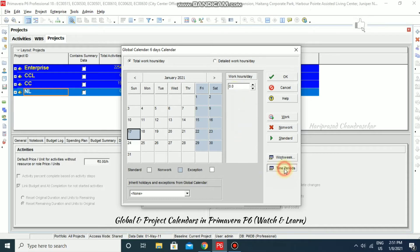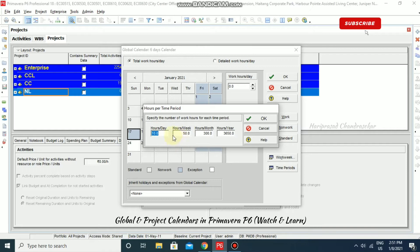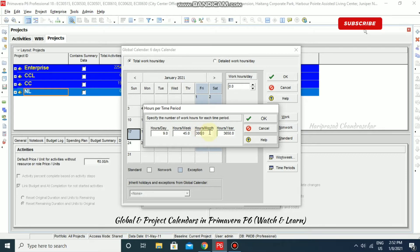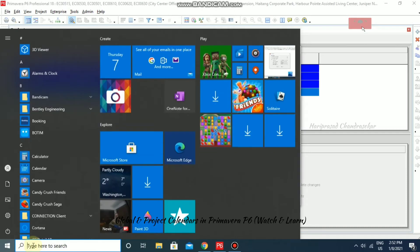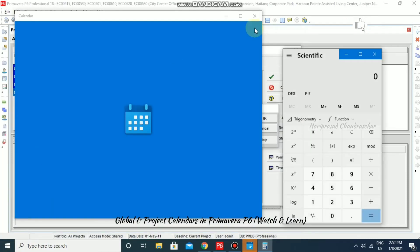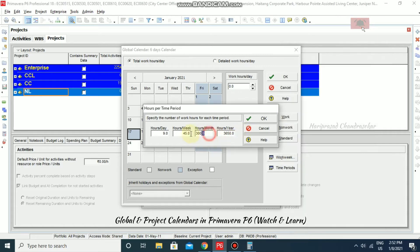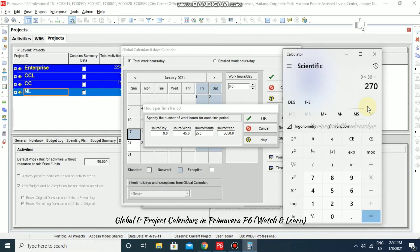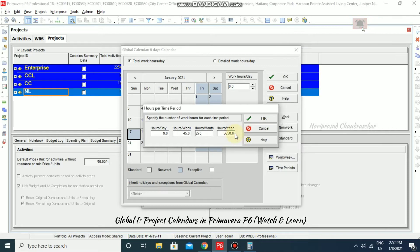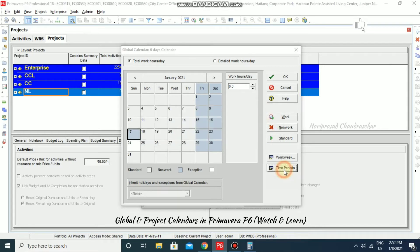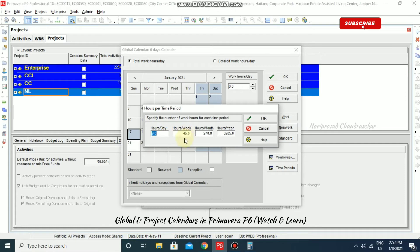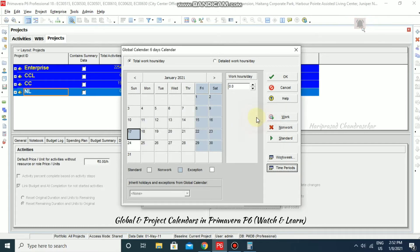Under Time Period, you can specify work hours per day, work hours per week, and work hours per month. For example, if you work nine hours per day, that's 45 hours per week. Per month, considering 30 days, that's 9 × 30 = 270 hours, and per year 9 × 365 = 3,285 hours. Enter those values and click OK. If you use eight hours per day instead, the weekly total becomes 40 and the monthly total around 240.